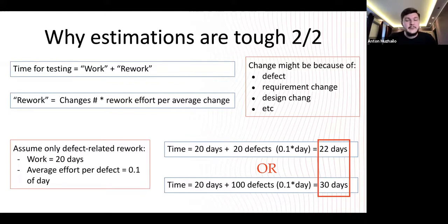For example, if your team completed 50 story points in the past release, and you had an average of 25 defects, then one story point is 2 defects. So this is your historical data. If you're planning to deliver 100 story points with the same team and same constraints, it will most likely be 50 defects, because 1 story point is 2 defects. So this is something we're afraid of, to use this historical data. We do believe that no, in the last release we were bad guys. We did many bad things, but the next release will be better.